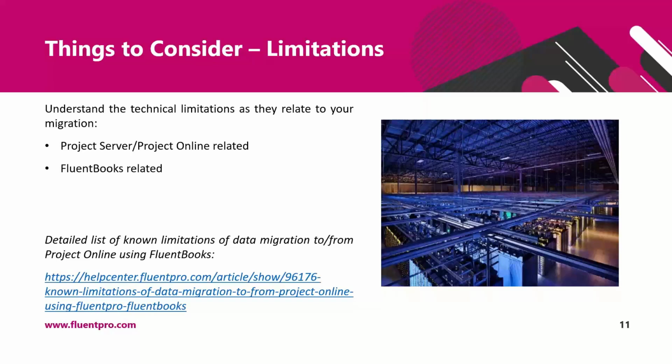There also may be some customizations in your Project Server and other items that cannot be migrated to Project Online as is. For example, some of the integrations or custom code that needs to be adjusted in the new environment. Identify them during the test migration and see how to manage those exceptions. Following this link, you will find a detailed list of known limitations of data migration to and from Project Online using FluentBooks.